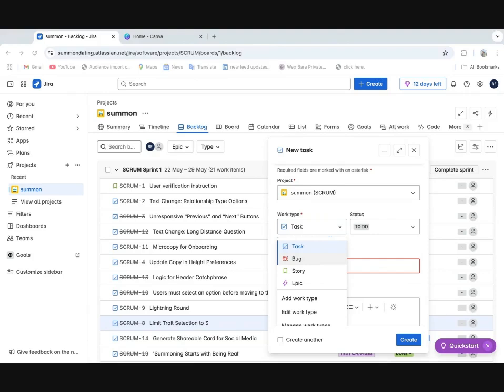Interesting. The story can happen without information, but you're right, it's a task. And the key reason it's a task is that a story is essentially you creating a whole new feature, right? And we'll come across stories here. A task is more like a simple thing, like implement email verification. That's just a task for the developer, okay? So that's a good example of a task, because you don't need to tell a story about email verification. That's a standard thing. It's a standard tool that already exists. They can just take that and easily do it. A story starts more like, as a user, I would like to, and we'll see some of those as well.